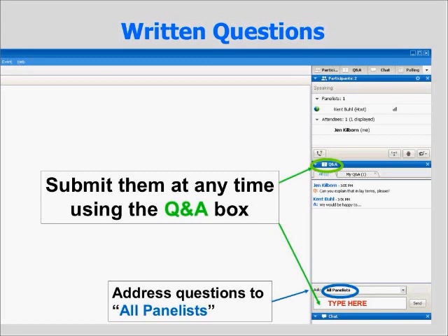Nicole asks, we are an NSP3 grantee doing only acquisition, rehab, and resale. If we expand our current target areas, do we need to do an amendment to our existing environmental review record to cover the expansion area? The answer is yes. Even if it's the same kinds of property, etc., you must have in your environmental record that you considered every property for which there's going to be some federal assistance.